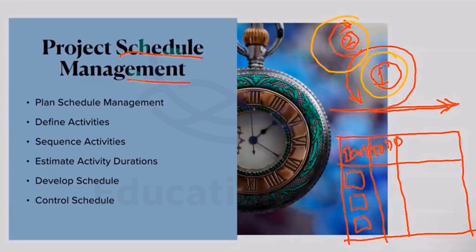So what is this to do? The Scrum Master reviews the list of tasks every day, and then he decides from the backlog, today we are going to do one task. Or if we have 10 tasks, the Scrum Master will decide that we will do 3 tasks today. So from this, the to do is selected at the start of the sprint. When I say sprint, it could be 2 weeks, 3 weeks, 4 weeks, it could even be just 1 week. So it's typically a 1 to 4 week sprint. On the first day of this sprint, he will decide that, okay, for this sprint, we will finish just 10 tasks, right?